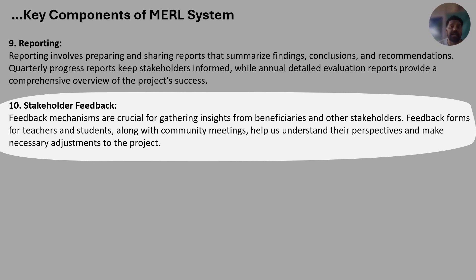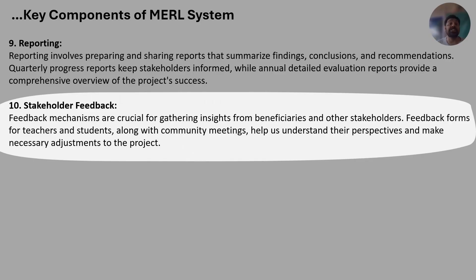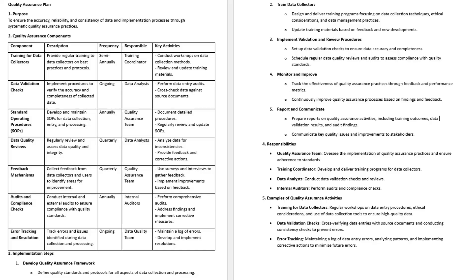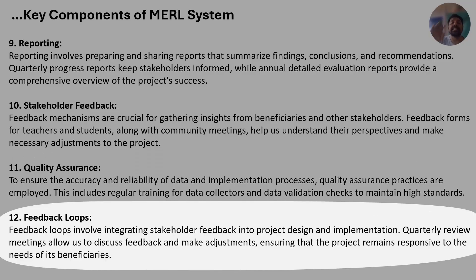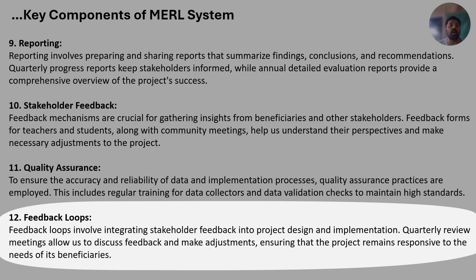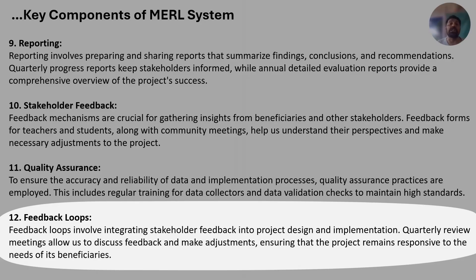Stakeholder feedback is crucial for gathering insights from beneficiaries and other stakeholders. Feedback forms for teachers and students along with community meetings help understand perspectives and make necessary adjustments. Quality assurance ensures accuracy and reliability of data through regular training for data collectors and data validation checks. Feedback loops integrate stakeholder feedback into project design and implementation — quarterly review meetings discuss feedback and ensure the project remains responsive to beneficiary needs.